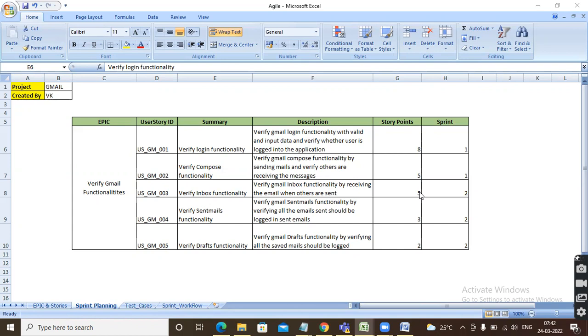Yes, we're going to use the planning poker method for each and every test scenario, to decide how many story points each gets. And where are we going to do it? In the sprint planning meeting. Okay, fine.